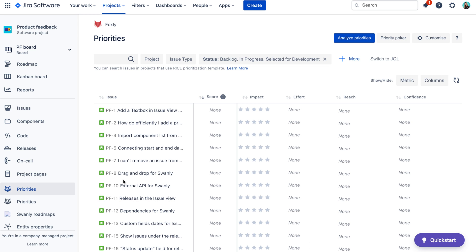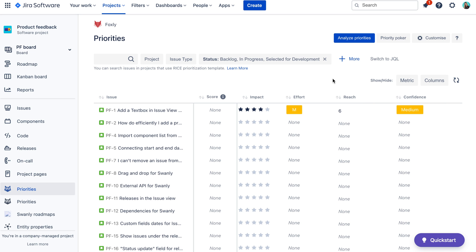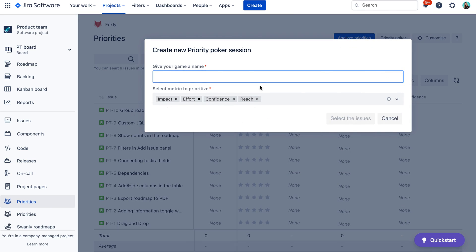Here in the table, you can see all issues from your project. In Foxly, you can assess metrics like effort, confidence, and impact. The priority score is then automatically calculated for each issue. To prioritize these issues using the priority planning poker method, click on the priority poker button and create a game.